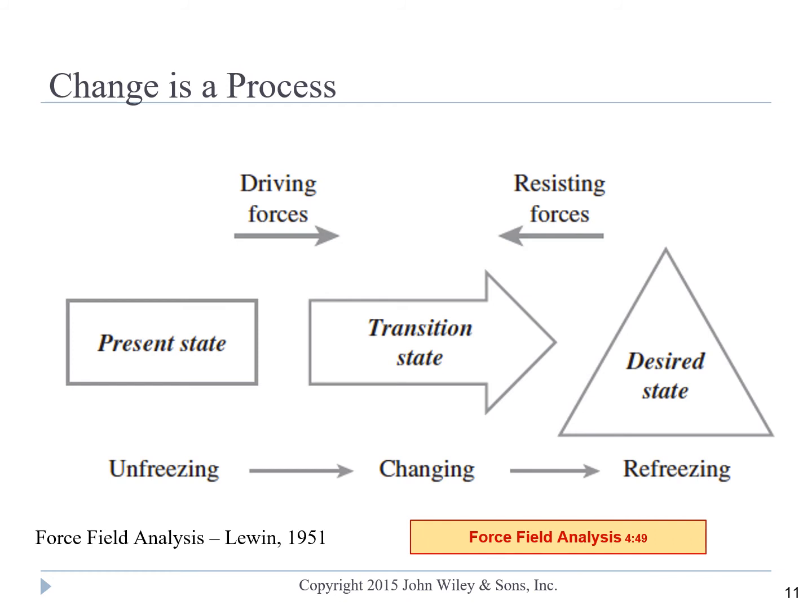And those are the forces that are opposing the implementation of this change. And looking at both of those and then deciding what actions to take is what Lewin came up with as the force field analysis.